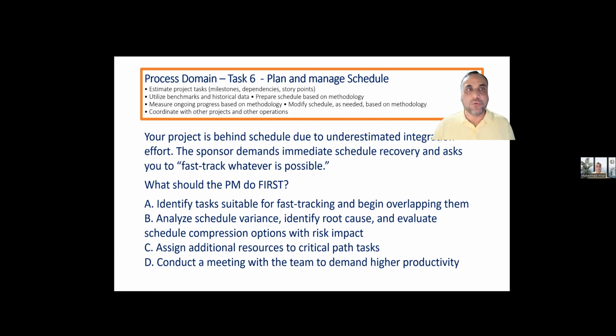Based upon that, we need to estimate the duration of the activities. Duration can be estimated by analogous estimation from the past, parametric estimation by maths, bottom-up detailed estimation, or if you have uncertainties, you can use 3-point estimations. To make the project schedule, we can use the critical path method, which is the least float available to complete the project, or the critical chain method, where we can add buffers in the resource activities to avoid any rework or to have the capability for contingencies. And we can monitor and control it with the help of earned value.